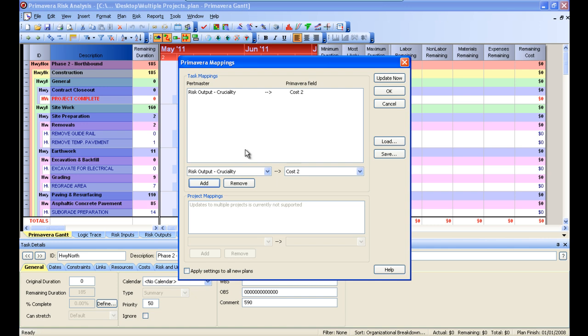So if I wanted to do a probability level schedule with probability 80 durations, I could make a P80 schedule by pushing the P80 durations to a Primavera field called P80 durations. Then I would do a global edit in Primavera, and then I can make that data live to the remaining duration field. It does that on purpose because it doesn't want users to corrupt their database or corrupt their data. You can only do so much damage when you're pushing data to user-defined fields, whereas if you were to overwrite important live fields, that would be an issue.